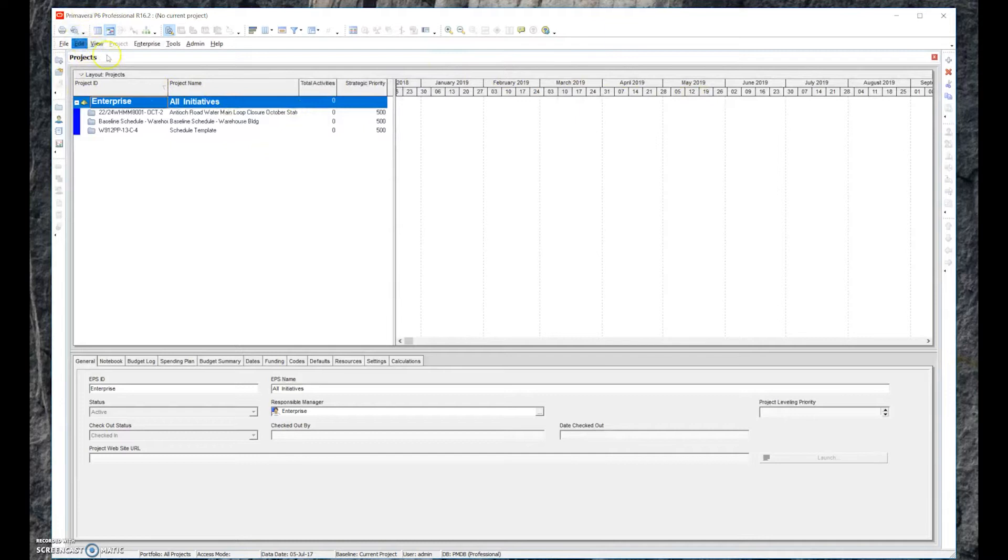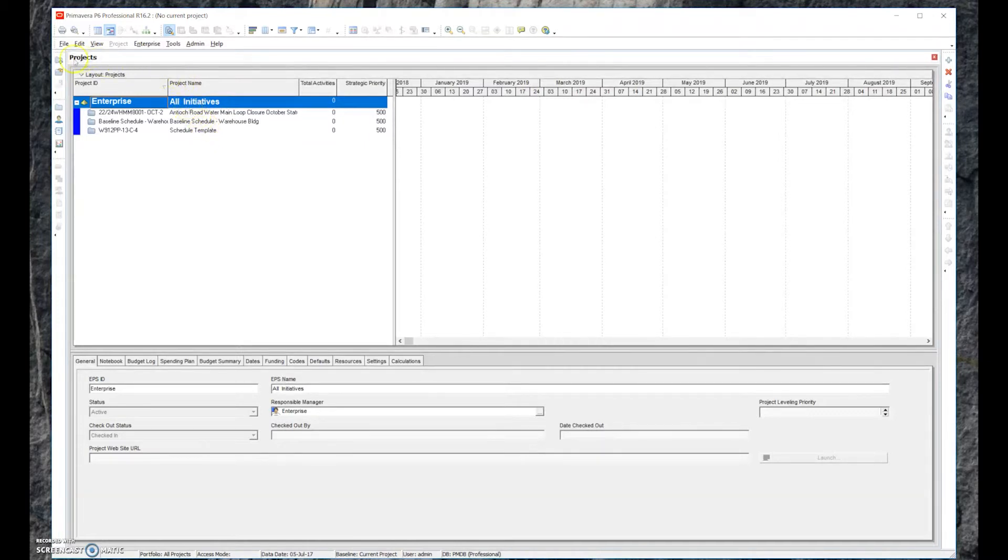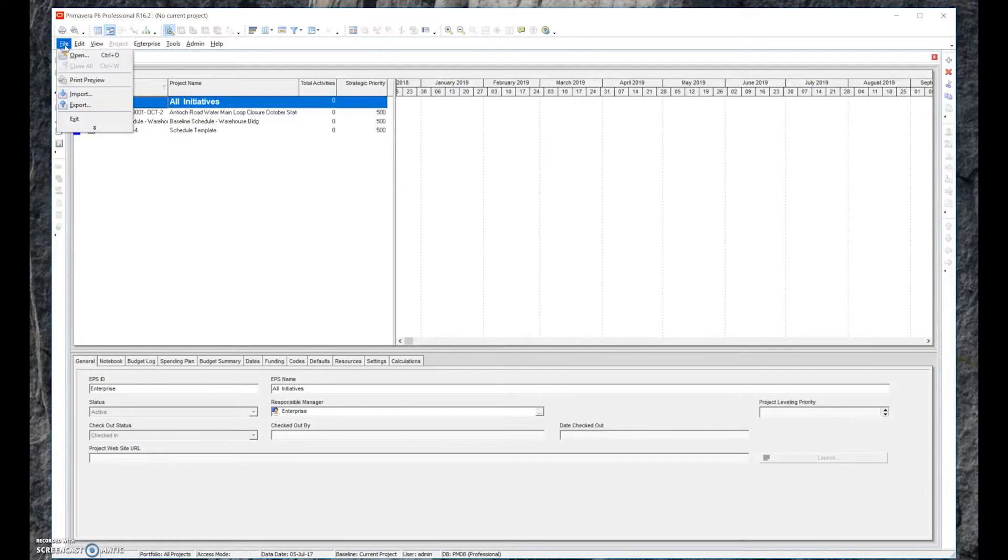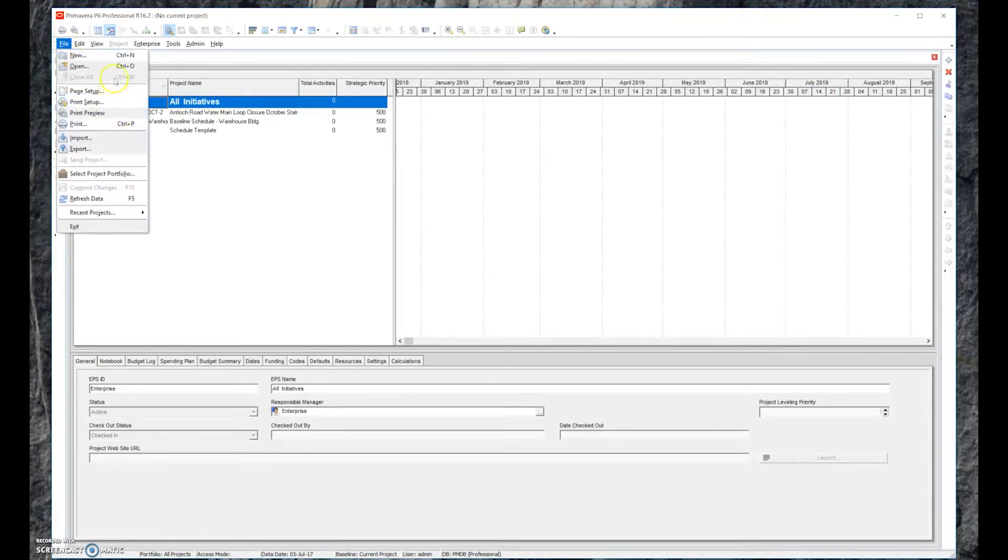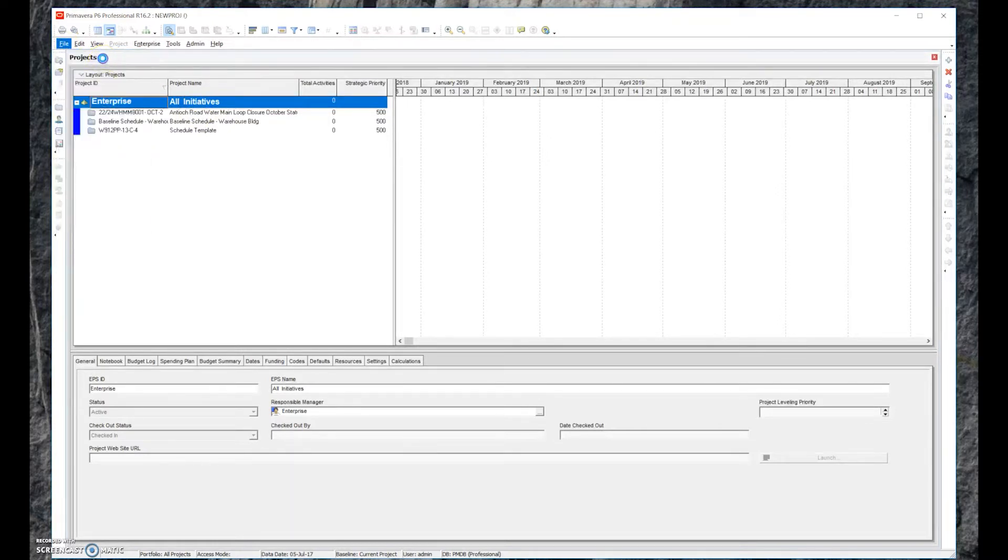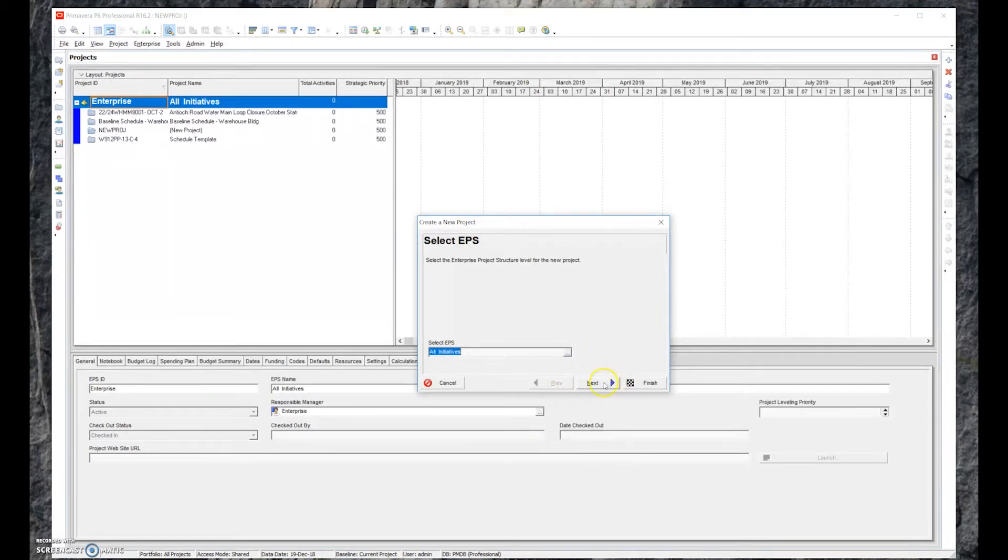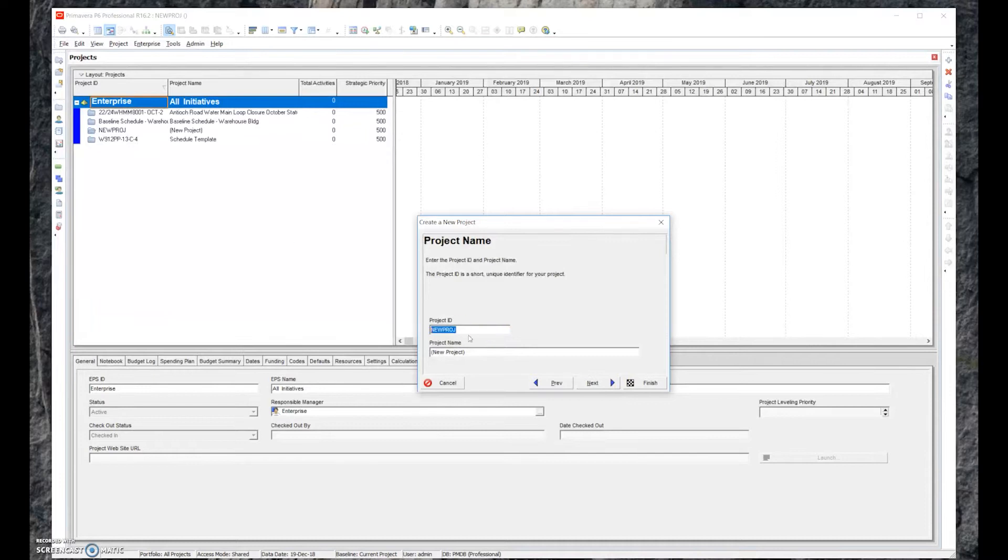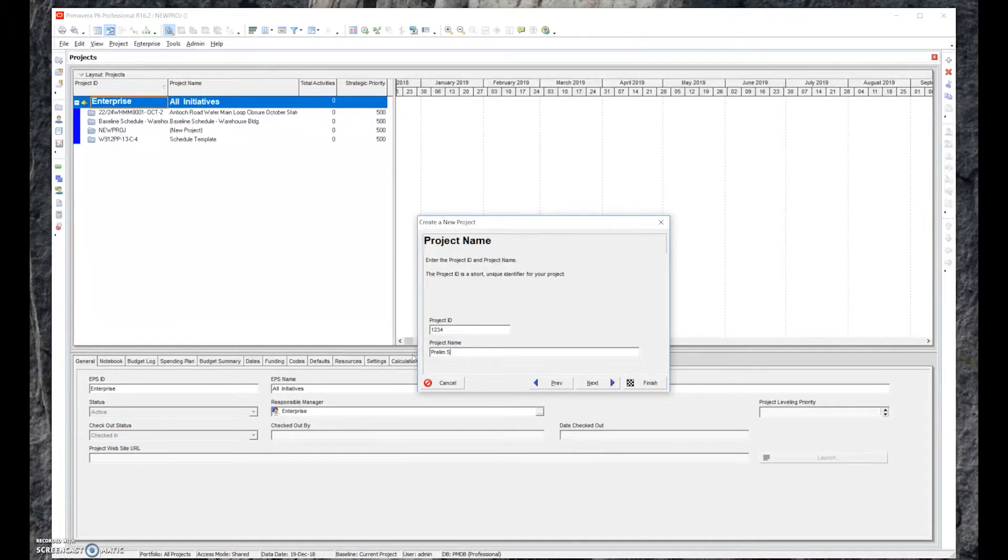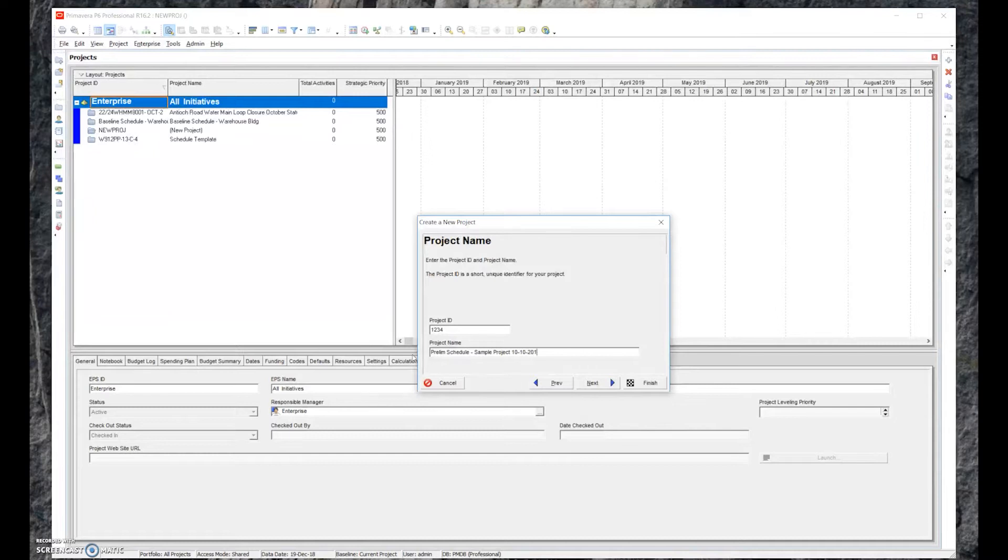Because we're using P6 Pro, you can have multiple different projects that show up in the enterprise version. We want to set up a project, so we'll go File and then create a new project. You can walk through the wizard. I don't necessarily like to walk through all the individual steps. I'll give it a project ID, we'll just say 1234, and we'll give the project name. We're going to call it Prelim Schedule Sample Project and give it a date. I'll just pick an arbitrary date here, 10-10-2018.